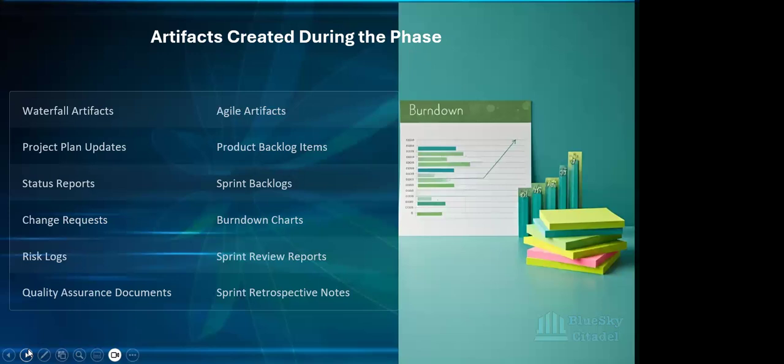Even in my workplace, in our reports, you rate them. So you have a RAG rating: red, amber, green, depending on the status of the project. If things are going to plan in terms of time, you will say it's green. Or if there are certain things delaying the project, maybe it will be red or amber. So that's where you would do that.